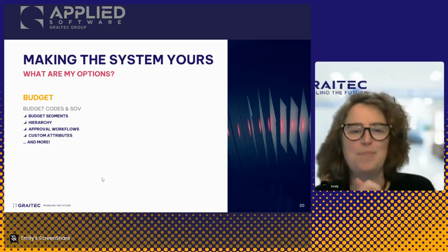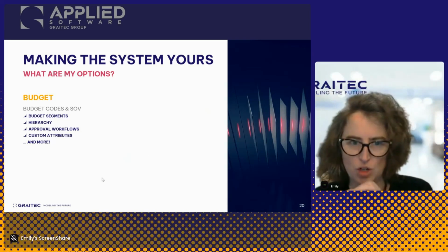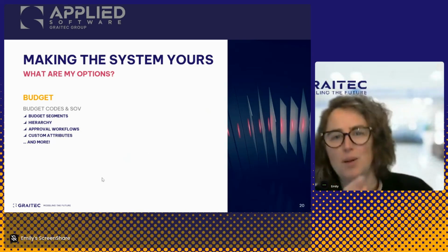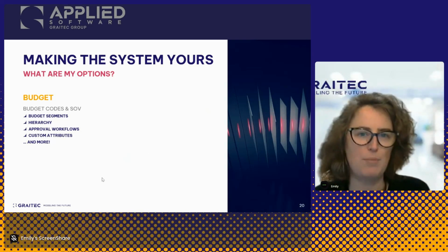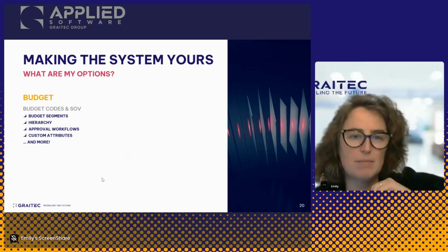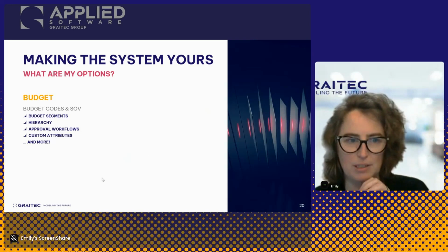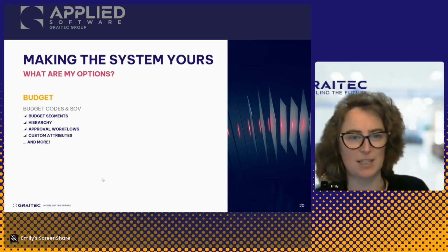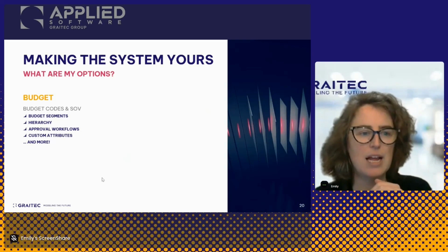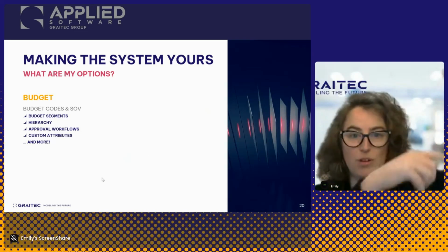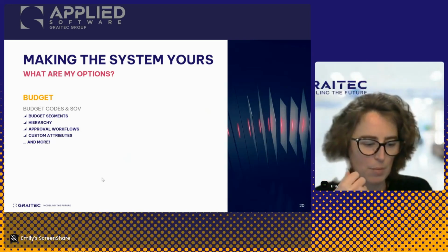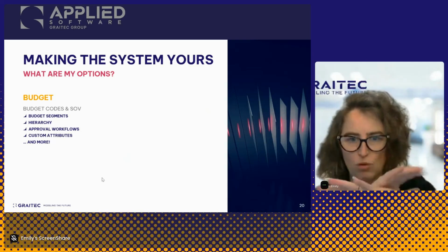All right, good. So let's take this chance to standardize. We are going to get that 1,000 potential items, and we're going to clean it up to your 600. That chunk that doesn't really fit the rest of the numbering system, let's make it fit the rest of the numbering system. Do we need a whole new numbering system? Do we just need a new master code, right? Some sort of heading title that can now incorporate. Can they be filtered into the rest of the scopes? How you are going to set that budget code up is probably the single most important thing across everything.